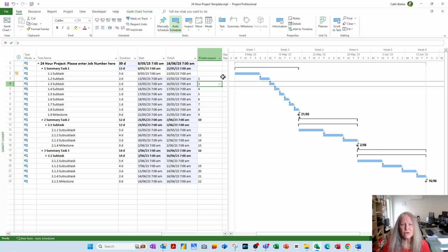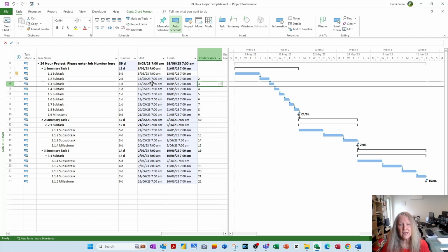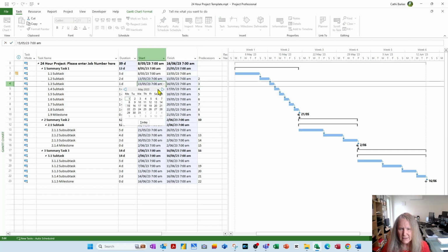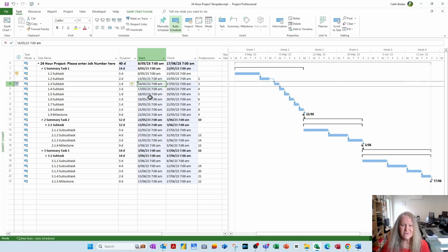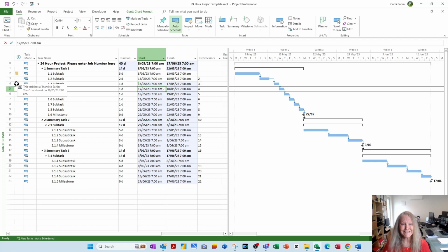Whatever you do, I feel, do not edit your dates and times. Your durations absolutely, but do not edit your dates and times. What you will do is inadvertently put a constraint on. Let me just show you. If I decide this is not going to happen on the 15th of May, in fact it'll be the 16th, I have now put a constraint on that task, whether I intended to or not, and that's indicated by this little square appearing in what they call the indicator column. So this square is saying this task, because I pushed it out to the 16th, will now start no earlier than the 16th.